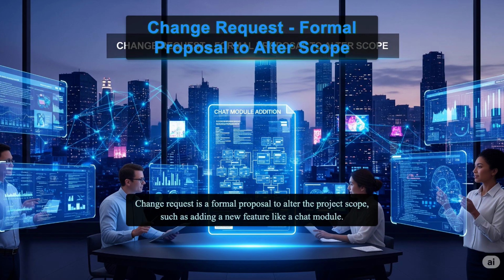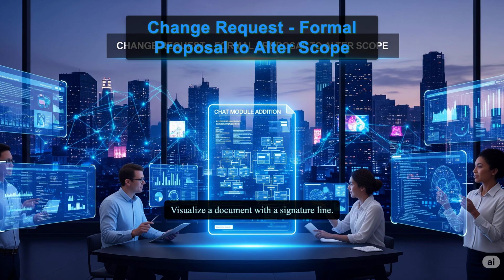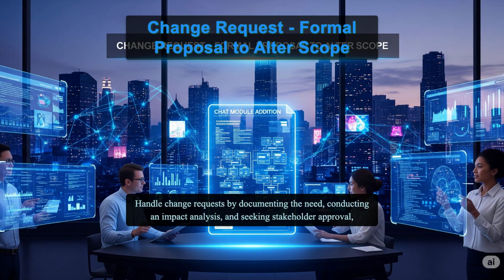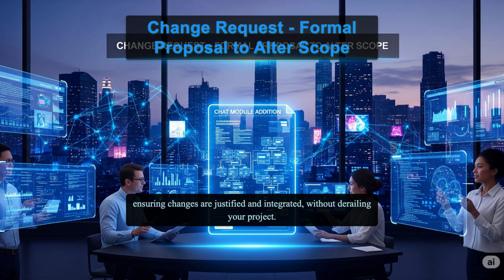Change request is a formal proposal to alter the project scope, such as adding a new feature like a chat module. For a full-stack dev, this might require assessing the impact on timeline and resources. Visualize a document with a signature line. Handle change requests by documenting the need, conducting an impact analysis, and seeking stakeholder approval, ensuring changes are justified and integrated without derailing your project.